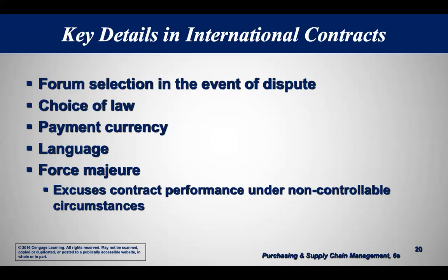So arbitration is done in a neutral country. They could pick Vancouver as the location to do the arbitration, in front of a judge and an arbitration committee or whatever, and it can be done here. So where are you going to do it in the event of a dispute? They'll say the arbitration will be conducted in Helsinki, another popular spot, according to the rules of the International Arbitration Association.